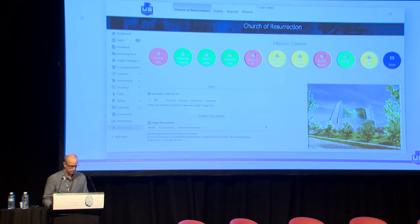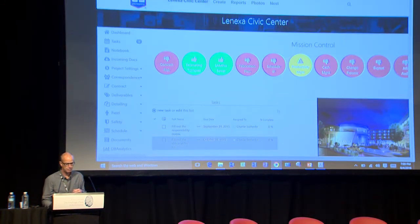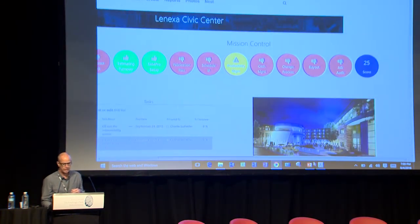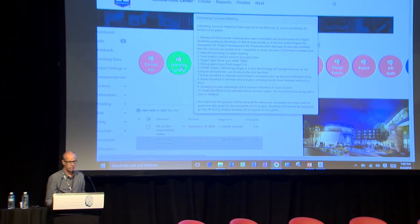I'm actually going to go off the PowerPoint for 1 minute, and I'm going to go live to our website. This is a project on our website. I'm connected with a VPN into our website right now. What these red, yellow, and green lights are is what we believe are the 10 most important planning processes on a project that have to happen in the first quarter of a job. To get those lights to turn from green to yellow to red, the project manager has to do something. If I pull this up and roll over it, you can see here's a whole list of what he's got to do to turn that from green to yellow to red.